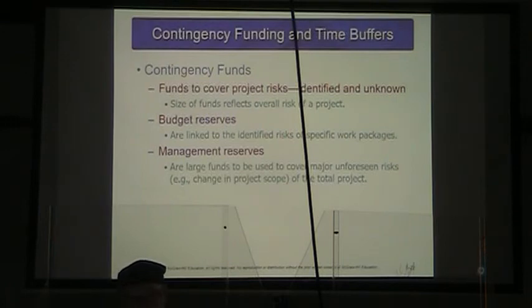We think there's a big risk that certain resources needed for a work package won't be available, we set aside a budget reserve and say, in case those aren't available, these funds will help us to rent or buy or make available the resources we need.